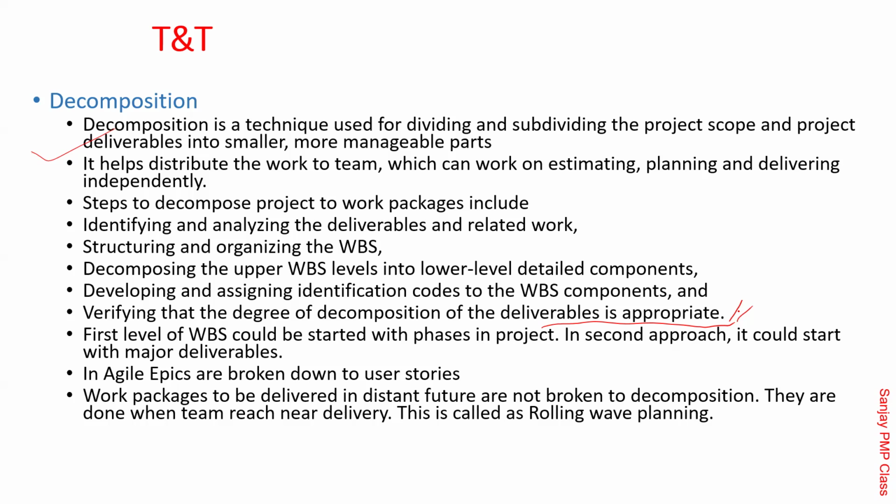So one of the ways is to use the phases of the project. Sometimes they could take major deliverables. As I told you, for a car, they will say the WBS is engine, chassis, body, gearbox, and break it down. So there are multiple ways. It doesn't matter which way you actually start.